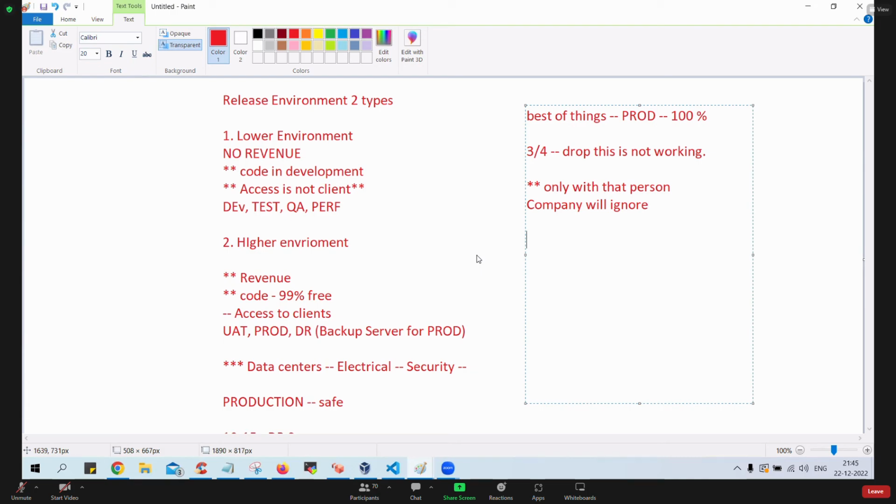But if I ask a different question: after 3 to 4 days, you got an email from almost 10% of your customers. Now that is where the company will react immediately. The team will react immediately, guys, because that proportion is 10%. And if it is a code problem, in the immediate sprint, on priority, they will apply the fix and immediately do a new release. Am I clear on this point?